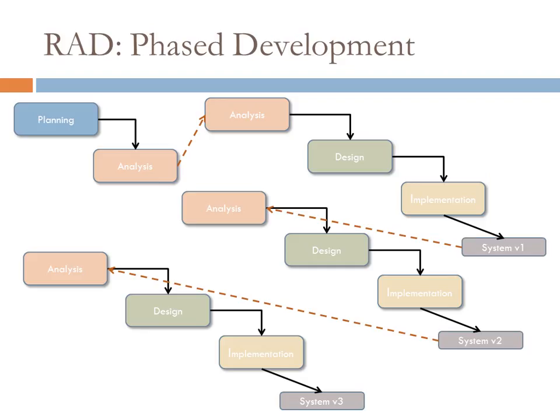Right, so in this development, you go through this initial planning and analysis, and then you prioritize the key functionalities, right? So the things that you absolutely as a business cannot live without are the ones you prioritize first. And you set about the process of actually developing that functionality first. Right, so that results in an initial version of the system that is a working system that can actually be used. Meanwhile, you then use that system as a baseline for developing the next set of required functionalities, right? Which allows you to then build in additional and improved functionality for the system.